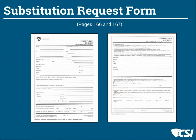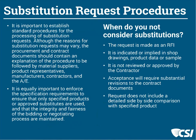Here are substitution request forms, and I highly recommend using them in your supplementary general conditions as part of the project. Just as with change orders and how you want numbers formalized, these forms help you compare and formulate a decision about a substitution request so that you are comparing apples to apples. The practice guide includes these forms in detail.